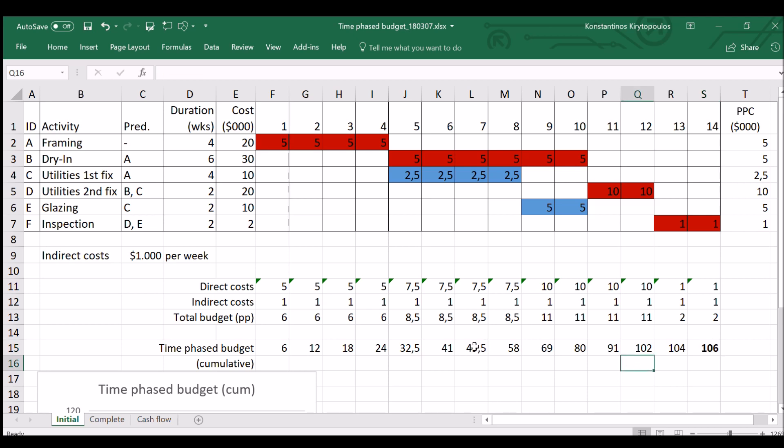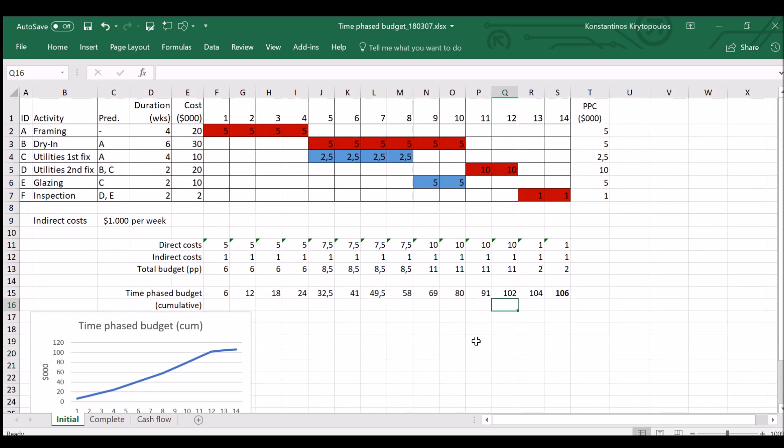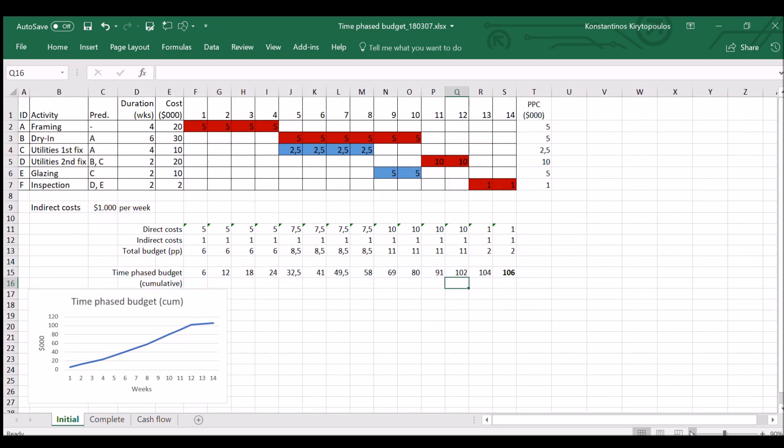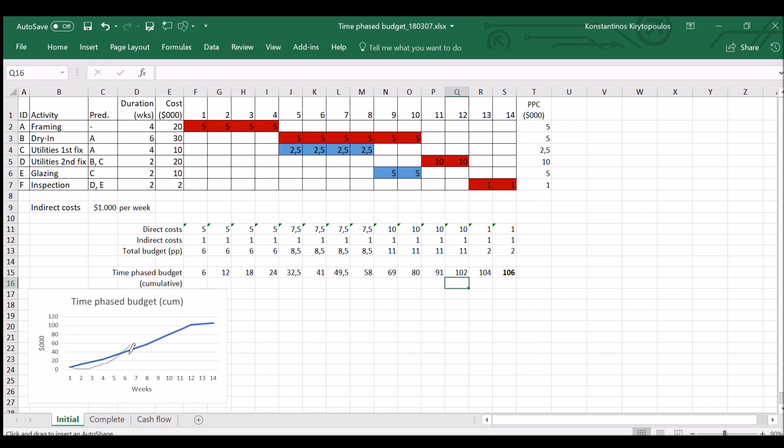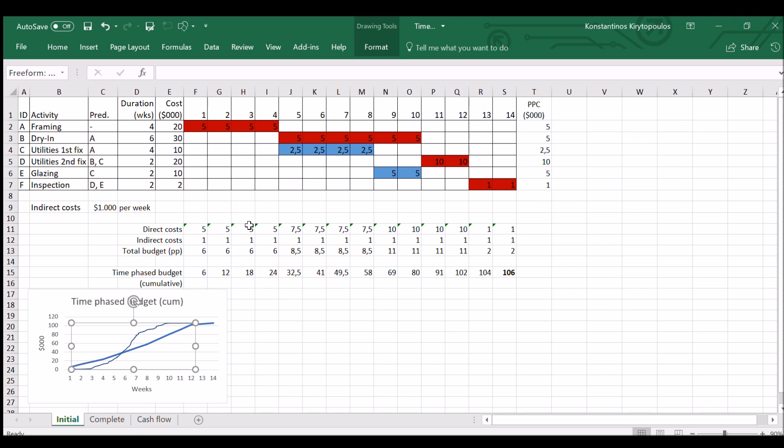If we do a diagram for that, the diagram would be like that. So we have a typical curve. This is a very small project, so it doesn't look like the usual S-curve. But usually what you're going to have is a typical time-phased budget will look like an S-curve, something like that.